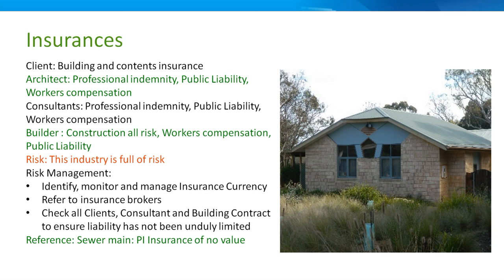If you have in specification and preliminaries, builder do site detection, services detection, and we've checked. We've got all the readings from the local authorities, and we can see these 3 lines, and they look like sewer lines. And so we send this to the hydraulic engineers. Can you check that? Yeah, it's okay. Siting's fine. There's nothing there. There's 2, but they're outside the site.